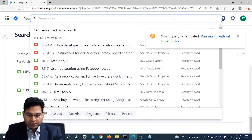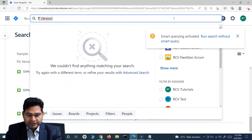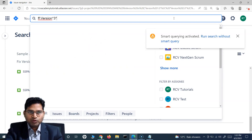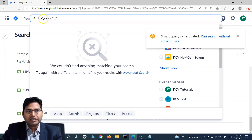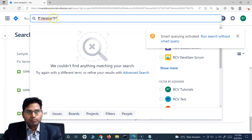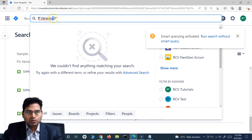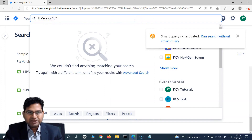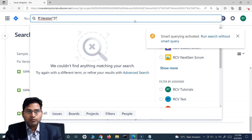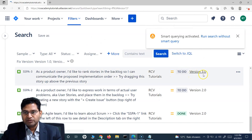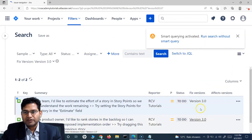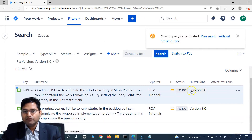For fixed version with spaces, I'll type 'ff:version*3*' — using 'ff:' for fixed version, then 'version', a wildcard in place of the space, then '3', and a trailing wildcard. This filters all issues with a fixed version containing 'version 3.0'. You can see two issues have been filtered for the fixed version which have version 3.0 in them.